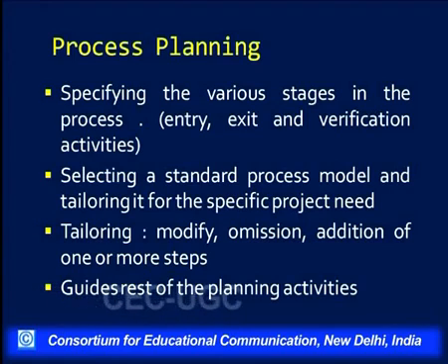There are a lot of standard models which are used. We've already discussed those software process models, and each software project is different from the other, so there cannot be one standard, one size fits all. Therefore, an important aspect is that for each individual project, the model has to be changed a bit to best suit the requirements of that specific project or product. So tailoring will be required for this, that is customizing the process model and making it best suitable for the current project.